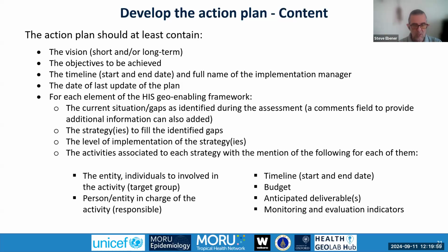Again, they might be, for the moment, either a subset of objectives depending on the size of the gap, or it could be really objectives going until reaching the vision. Then the timeline, of course, start and end date, as well as who is in charge of implementing this plan. If there were several versions of the plan, it's important to also capture the date of the last update of this plan.